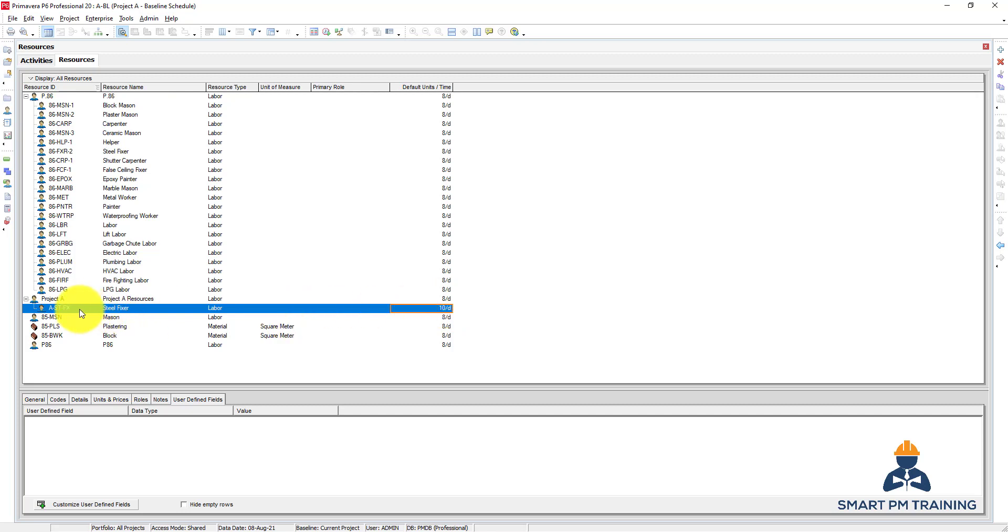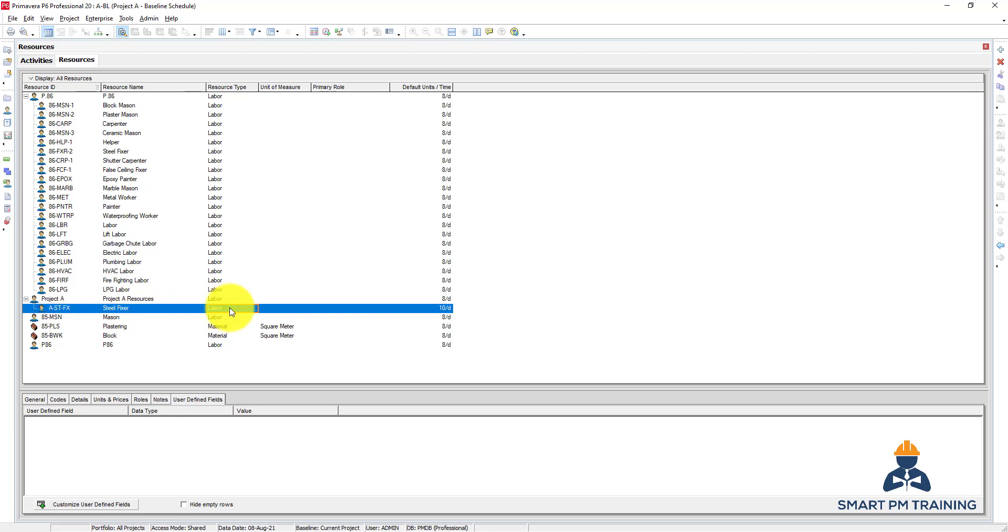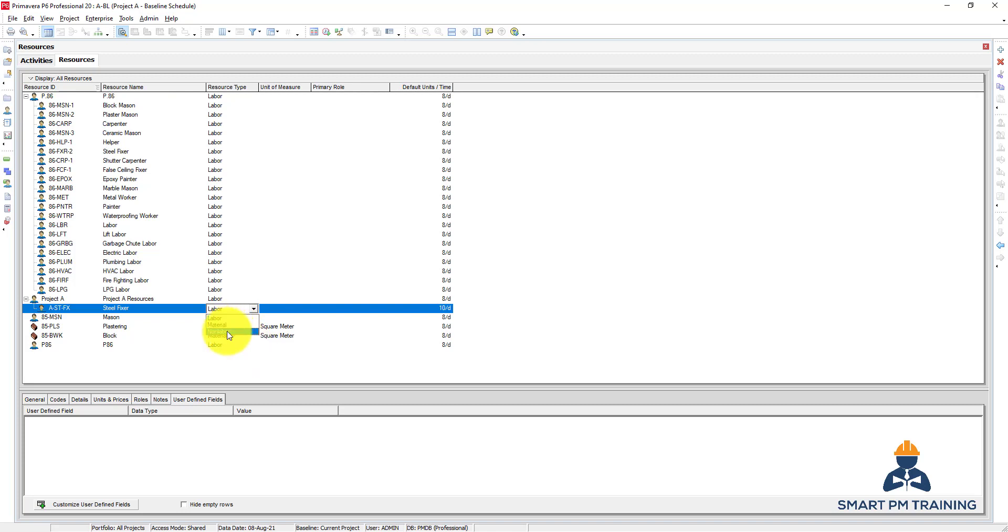I have also the resource type, so it can be labor such as a steel fixer or carpenter or tile mason. I have also material, which can be ceramic tiles, backfilling materials, steel. And non-labor such as equipment: excavator or compactor or any sort of equipment. So these are the three types in Promovera.